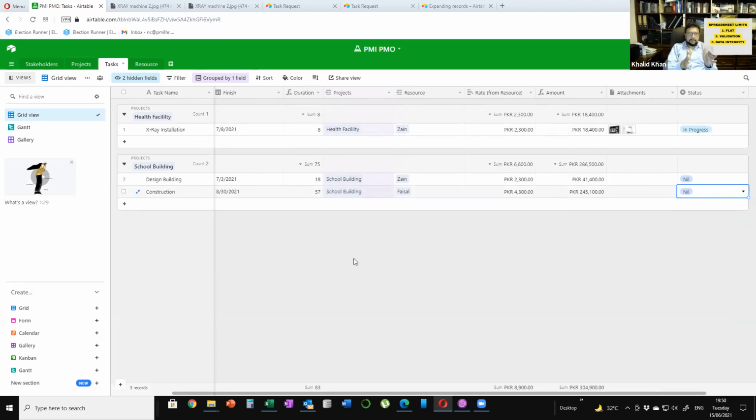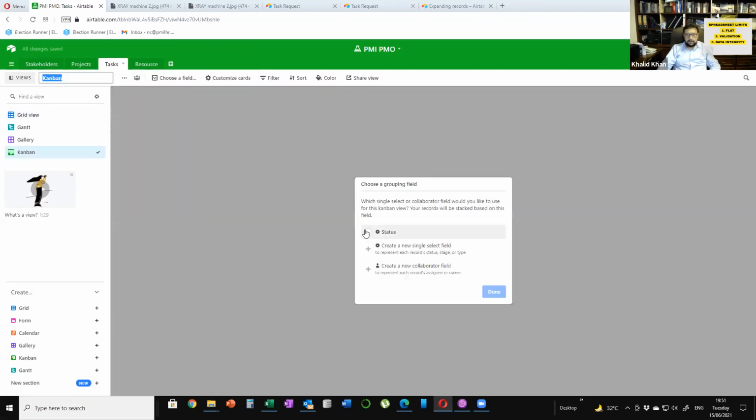So keep the activities that you're going to be working on right now in one folder. Keep the activities that you finished in another folder, and the ones not yet done in a third folder. And what that allows me to do is when I go to a site, I can just pick up the one, just see what has been done and go and inspect it, or just see what is being worked on. So that's easy here. So that's a Kanban view. And we just do that.